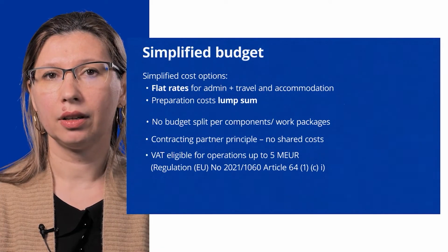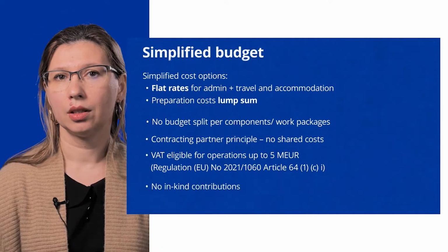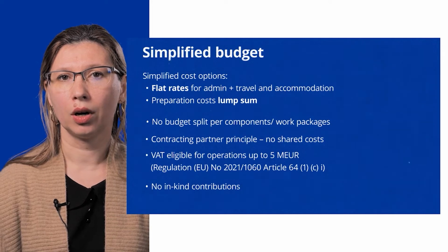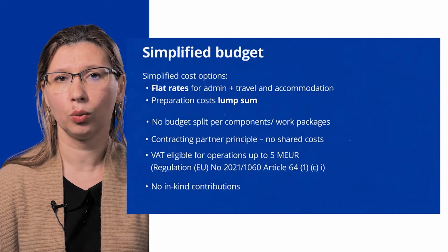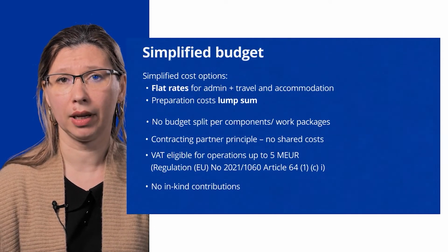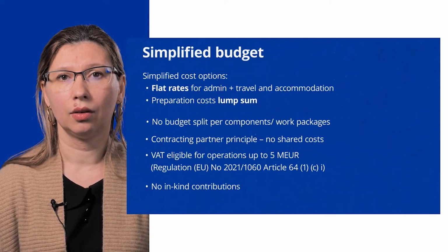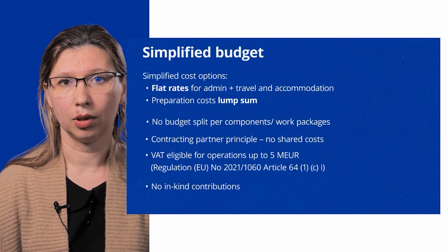We specifically refer to in-kind contributions. So, the provision of works, goods, services, land or real estate for which no cash payment has been made, such as unpaid voluntary work, are not eligible. I believe that we can all agree that staff costs of personnel working in one of the partner institutions are not unpaid work. So this expenditure is safe and belongs to the staff cost category.